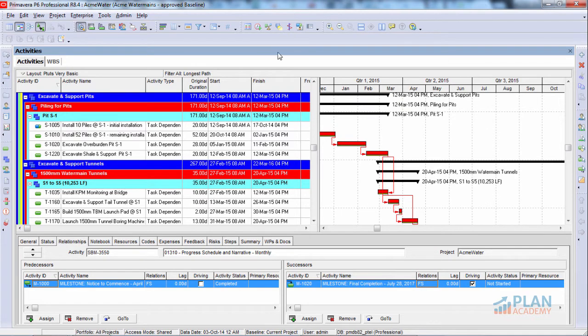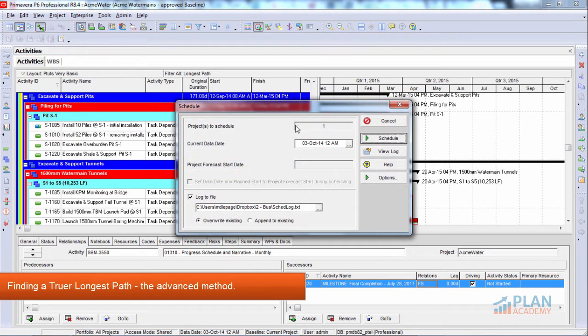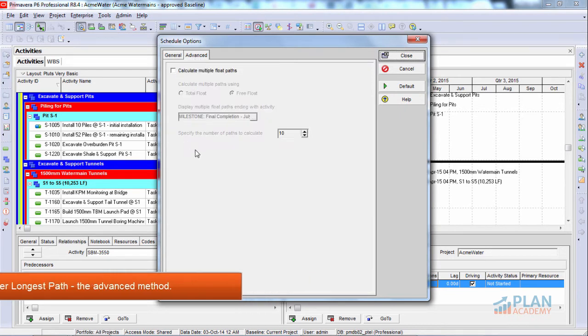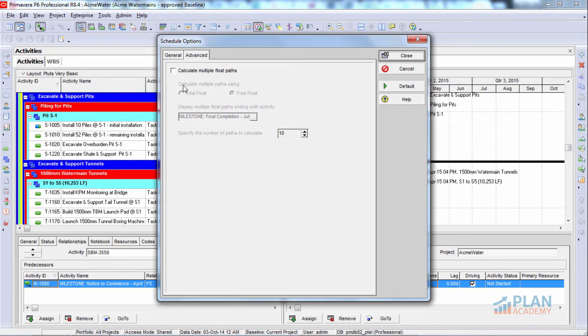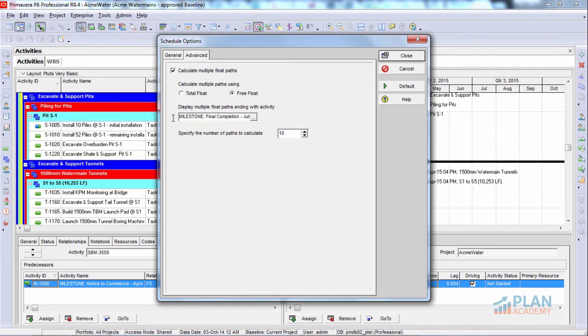Well, I'm about to show you. Let's go back into our schedule options and let's go and check out the Advanced tab. Now, using this advanced feature of P6, the Calculate Multiple Float Paths, we can actually get a truer longest path, the ones that filter out the problem issues that we just talked about. So if we turn this on and choose these options here, calculate multiple paths using Free Float, and simply define the final activity in the project here, we can come up with a truer critical path.